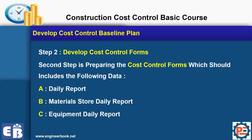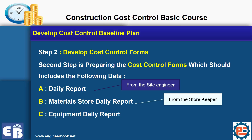What else do we need to develop? Step number two — yes, we need to develop the forms. According to our scenario and case study, we developed three reports. In your real projects, you may split these three reports into five, or combine them into two. It all depends on your scope of work and site conditions. But if you understand the concept, it will be very easy to modify later on. We need a daily report from the site engineers, a material stores daily report from the storekeeper, and an equipment daily report from the equipment supervisor.